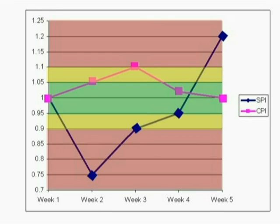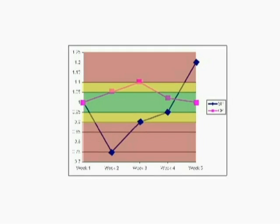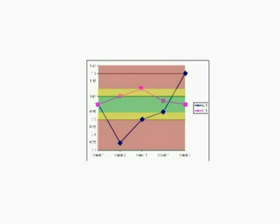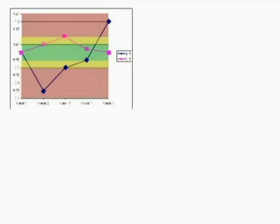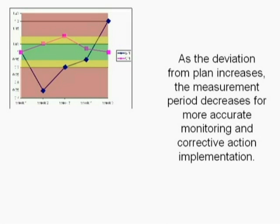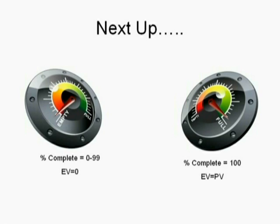Setting thresholds at 5% and 10% for EVM calculation periods and escalation triggers allows the project manager to not only report project status, but also what actions are being taken to get the project back on track and why. In the next video, we'll talk about how to measure completion percentages to ensure accurate earned value calculations.